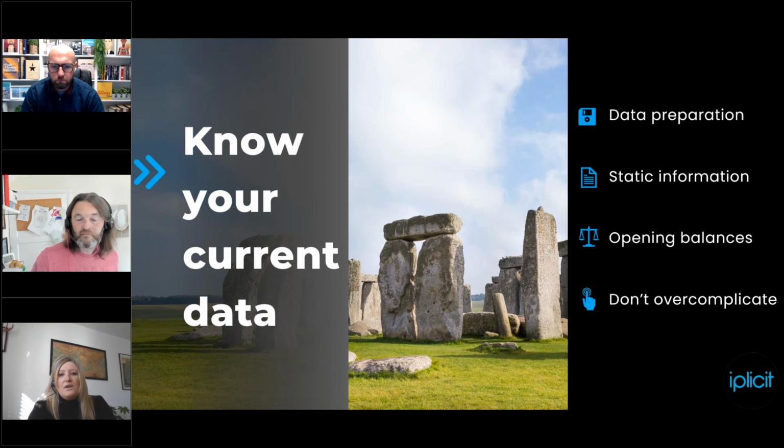So I think our preferred is that we would have an invoice in for each invoice matching in your legacy system, but just to balance, because we don't need it populating the P&L because it already is in your current system. So it goes to a suspense account. That's the really straightforward, and there's pros and cons around that, but it really is the tried and tested method. You could put period balances in your TB. So depending on when you go live, you've then got a whole year's worth of balances that you can pull through in your management accounts. So again, the project manager would step through all of those different scenarios and you will agree with them what fits. Please try not to overcomplicate.